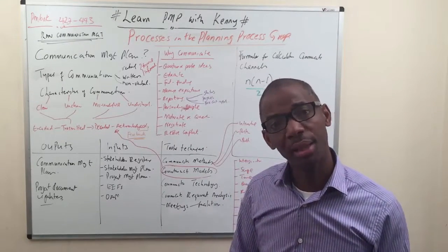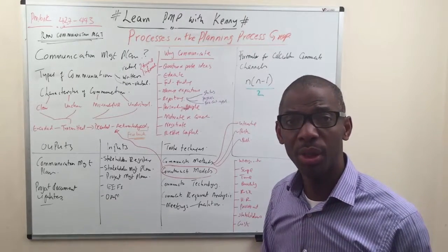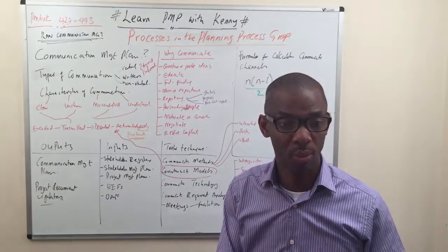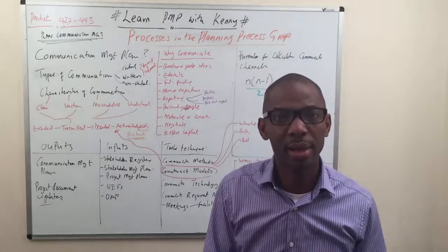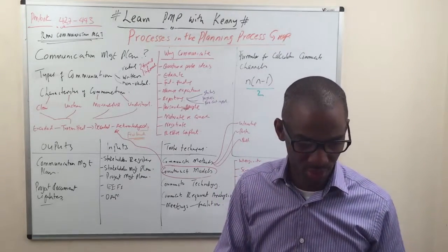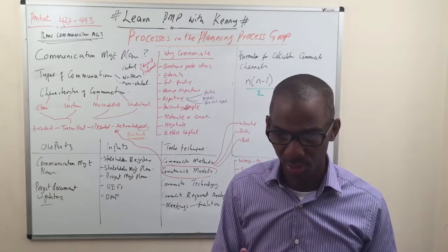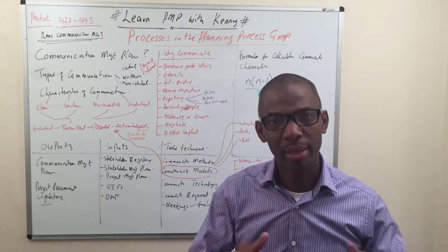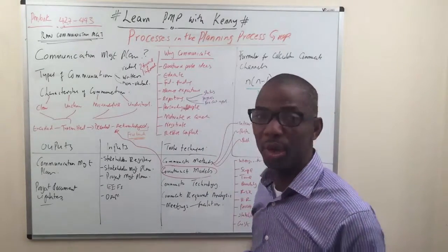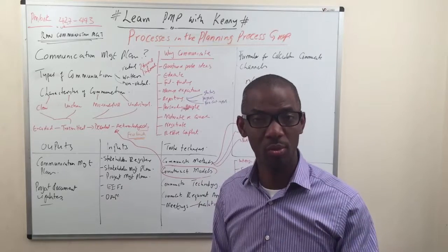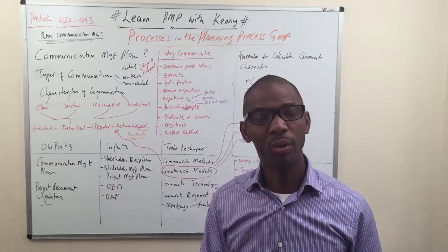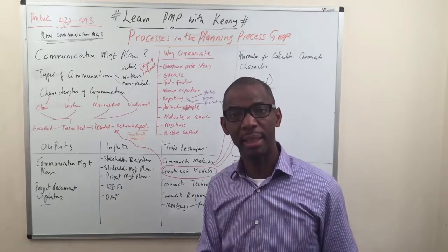Reporting, obviously, the three types of reports that you could potentially do in a project. You have a status report, which tells you exactly at one point in time what's happening to the project, which is an elaborate type of report. You could report on the cost, the time, the schedule, the issues, the risk. It's quite a detailed report of the project. You also have what you call a progress report, which could probably tell you, okay, this is where we are, we've gone 10% or 20% of the time, and a very quick overview of exactly where the project is at that point in time.